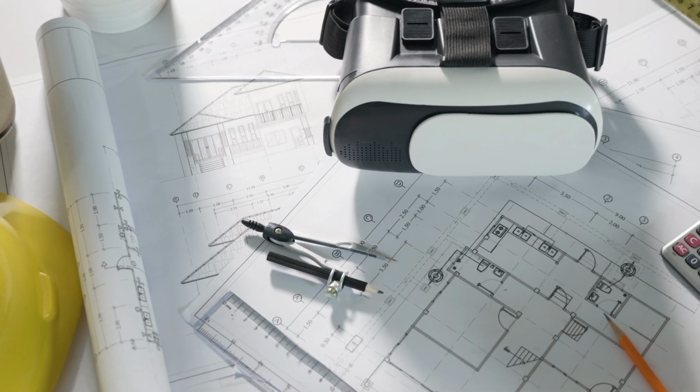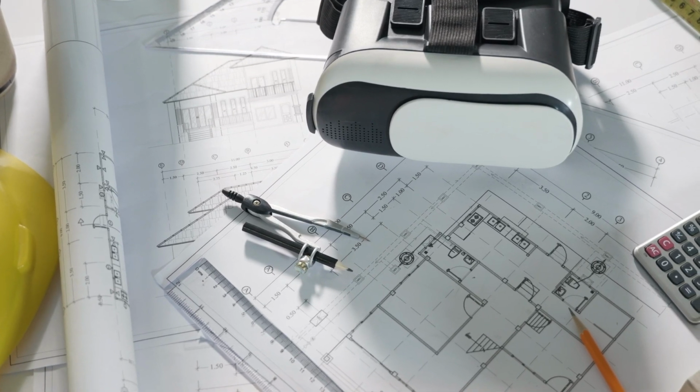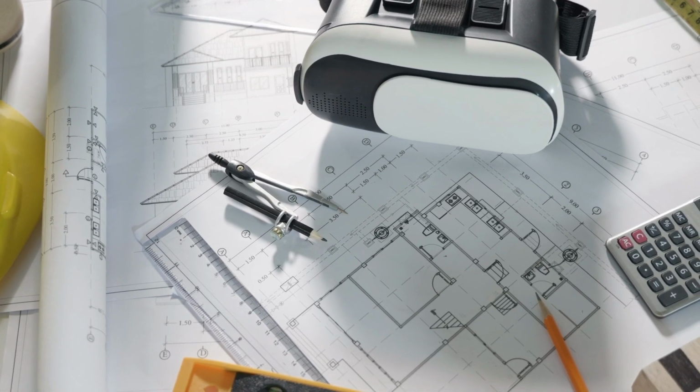The more necessary details you include, the better. For example, if you know you want a 36-inch fridge, note the sizing in the appliances section. Listing out every detail also helps your contractor remember to provide a cost for every item instead of leaving it until the end and tacking it onto your bill. It's important to note design elements that require specific framing, electrical, and plumbing, as these happen early on after demolition. These trades are expensive to bring back for things that you forget and why measurements need to be accurate.